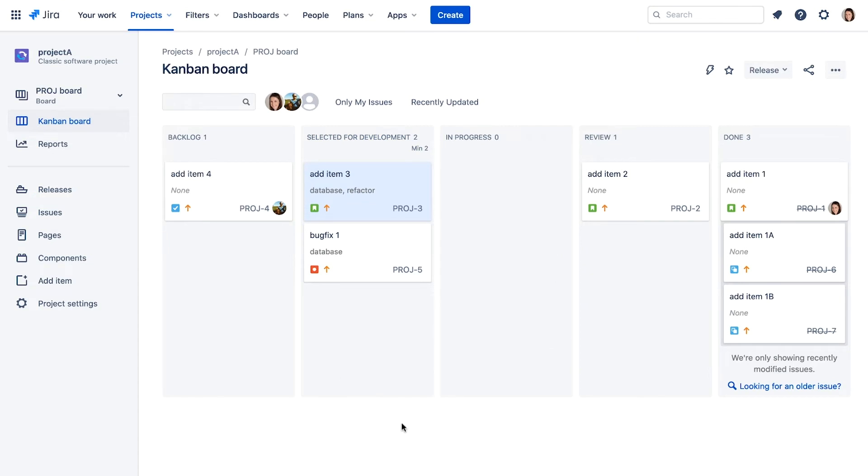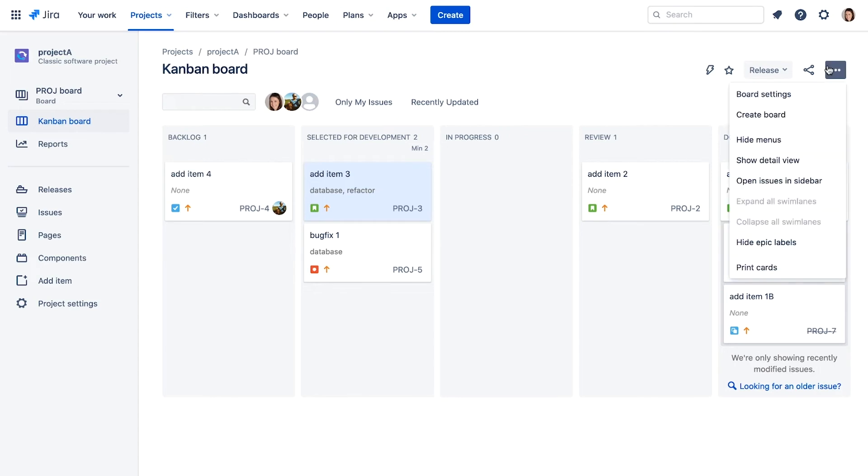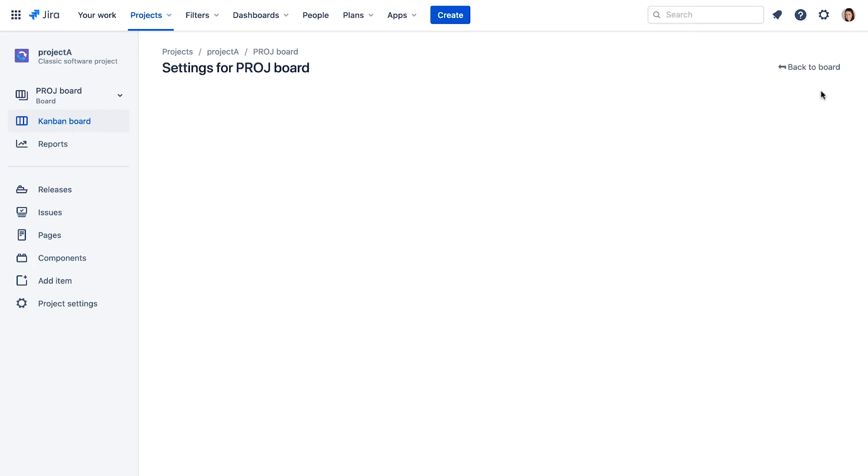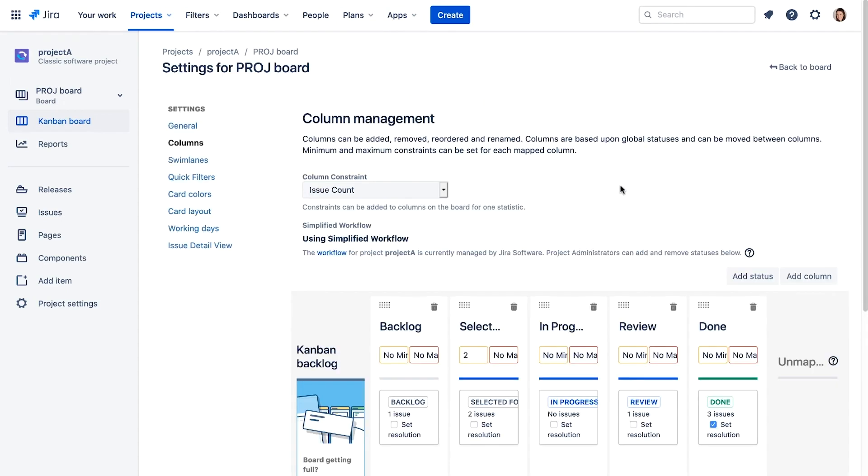A minimum limit like this is good to ensure the team always has work to do. When a team member moves an issue to done and is available for more work, they need to pull from the selected for development column. If there are no issues there, then that team member's work stops.